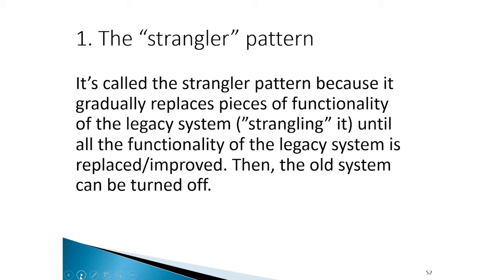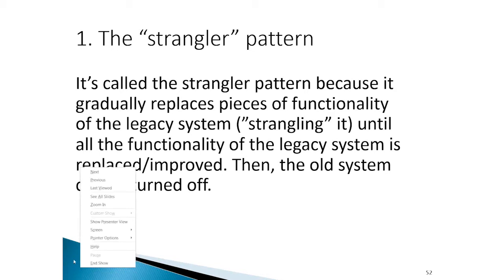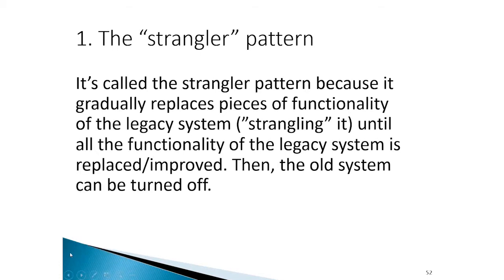So what that means is that caseworkers and users will be using both systems, both the new system and the old system, at the same time. And over time, their usage will switch completely to the new system, as the new system has replaced all of the functionality of the old system. Now, the chief advantage of the strangler pattern is that it means that you're able to move from a legacy system to a new system more quickly than you might otherwise, because your